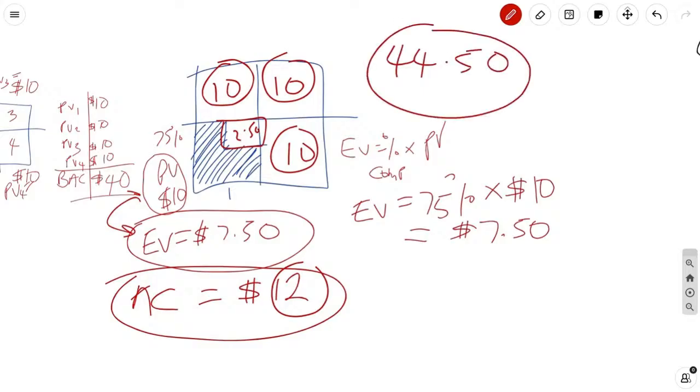Now, if we look at a worst case scenario, we could say, well, we spent $12 and we didn't get done. And if we look at the rate of spend and say each quadrant we spend $4, we can say we're not going to spend 250, we're going to spend 4 for this. So your estimate could then be, well, $16 for each quadrant times 4 is 64. Are you getting the idea? So the idea is to look at the current state, and based on your current state, you understand what your end state will be. And EAC is your end state.